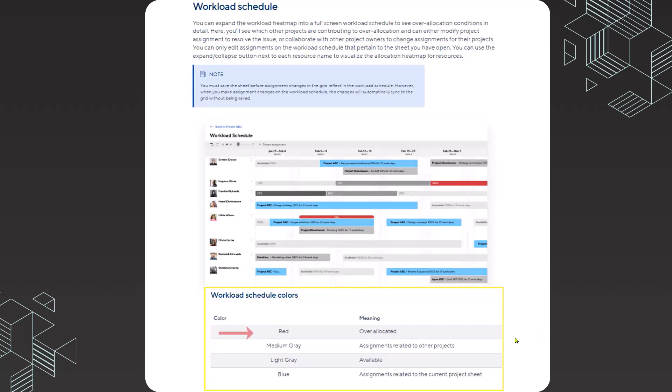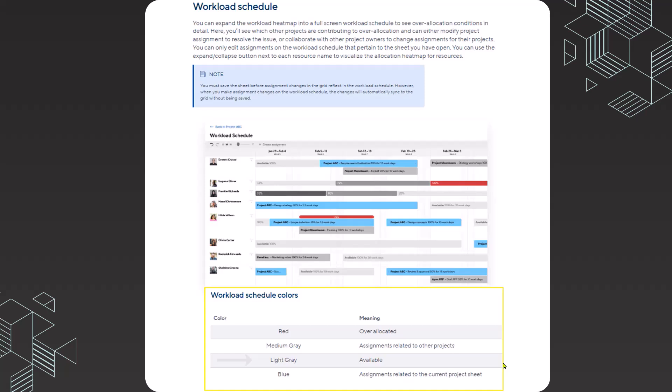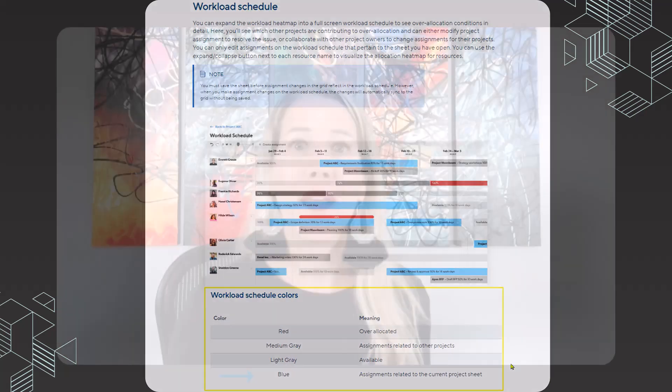Red still means that a resource is over allocated. Medium gray means that assignments are related to other projects. You cannot modify the resource assignments for those other projects because you're not working within that plan. Light gray means that a resource is available to take on additional assignments. And blue means assignments related to the current project sheet.